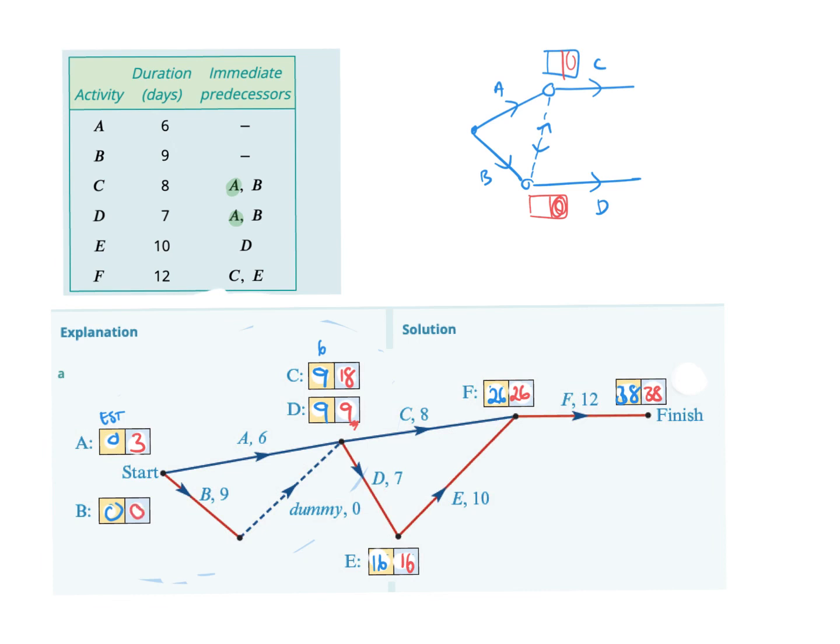So it's at this point that we might not have seen that. Our 9 was down here, and we had 9 and 18 up here, and we might have been tempted to use the 18 up there when we backtracked. It would have affected this number here, but we've done that. So just to refresh, the critical path is the one that has the numbers the same. So you can see that. We've gone along D, and then obviously we go back to B.